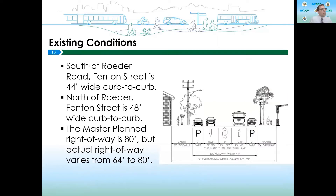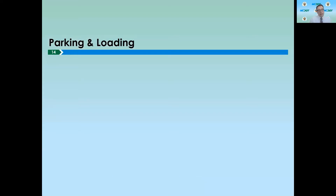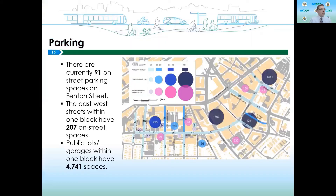In terms of what the street looks like right now, between Roto Road and Cameron Street at the very north end, it is 48 feet wide between the curbs — that's the roadway portion, not including sidewalks. South of Roto Road, it is 44 feet wide, so it's a little narrower in the south, making it more challenging to fit things in. In terms of parking, there are 91 on-street parking spaces on Fenton Street within the project area. On the east-west streets within one block of Fenton Street, there are 207 parking spaces. There are also 4,741 parking spaces available in county-owned lots and garages within one block of Fenton Street.